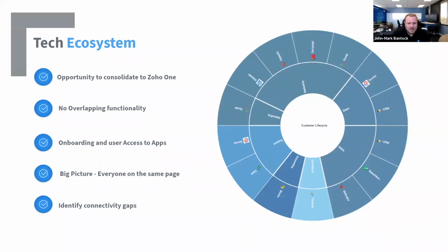Yeah, and I think that the balance that we try to strike is understanding what this tech ecosystem and this end goal is going to look like. We've got ourselves into traps in the early days where we would implement the immediate task at hand, that initial SOW, without discussing what the end state is going to look like 2 years from now. And then we end up having to re-architect the system because we didn't know that they were planning on moving the finance suite over from QuickBooks to Zoho Finance Suite.